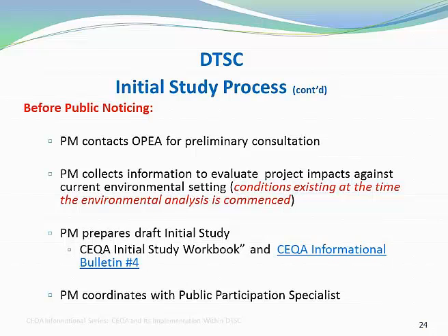The project manager gathers data and information for the project and current physical conditions or environmental baseline setting in order to evaluate the project against this setting. And the baseline setting is the current condition of the project site before the project takes place, or the conditions existing at the time the project analysis commences.